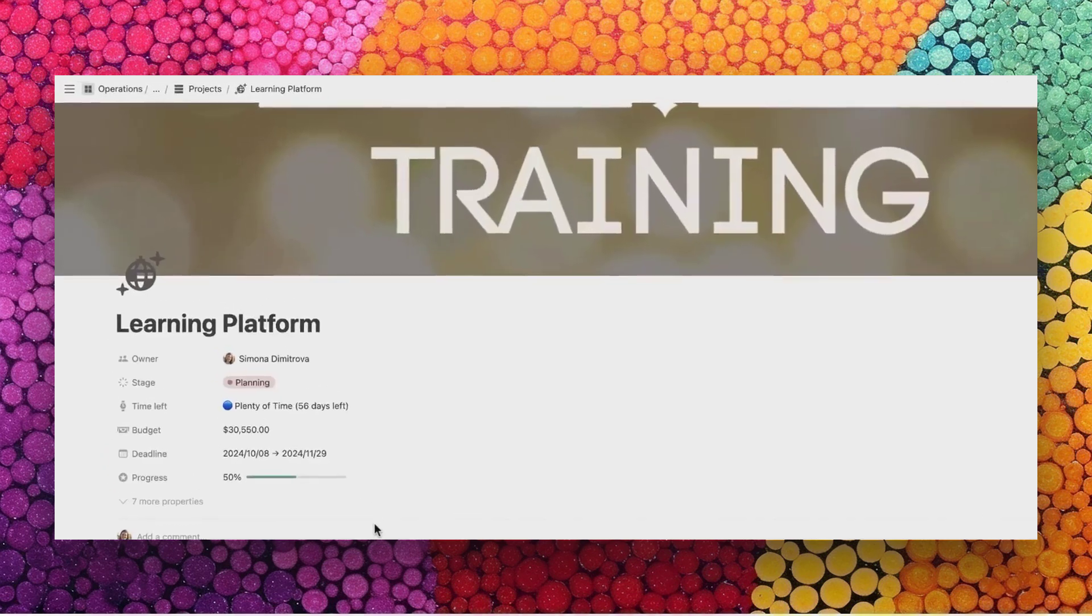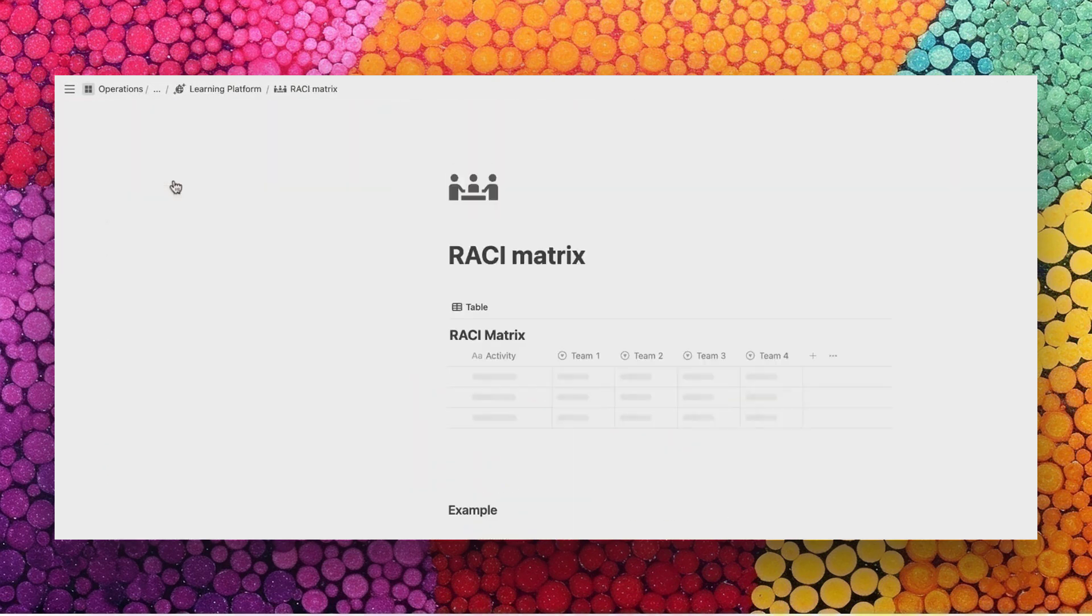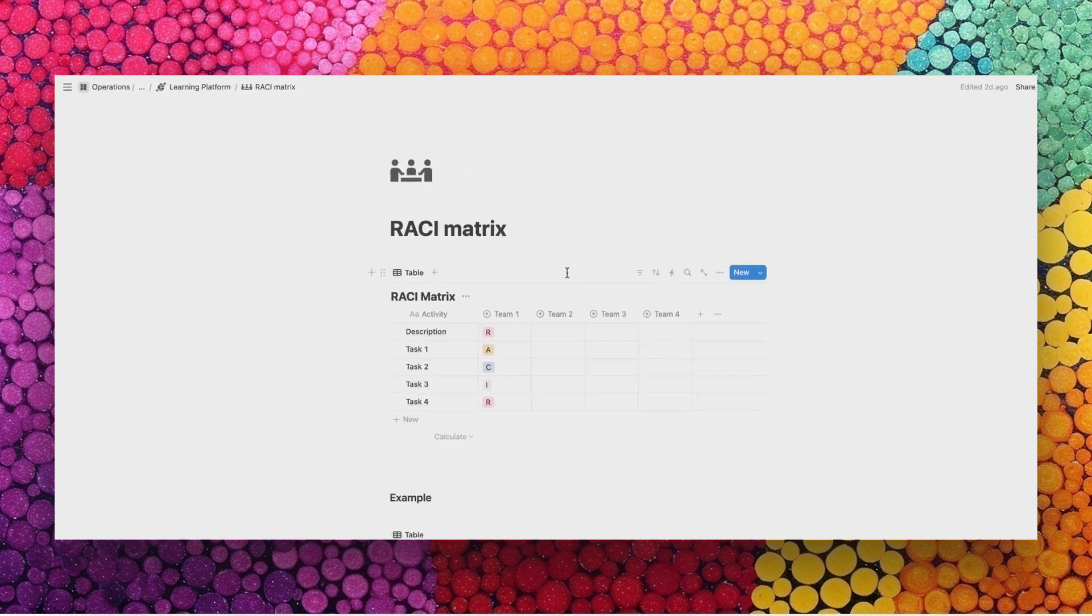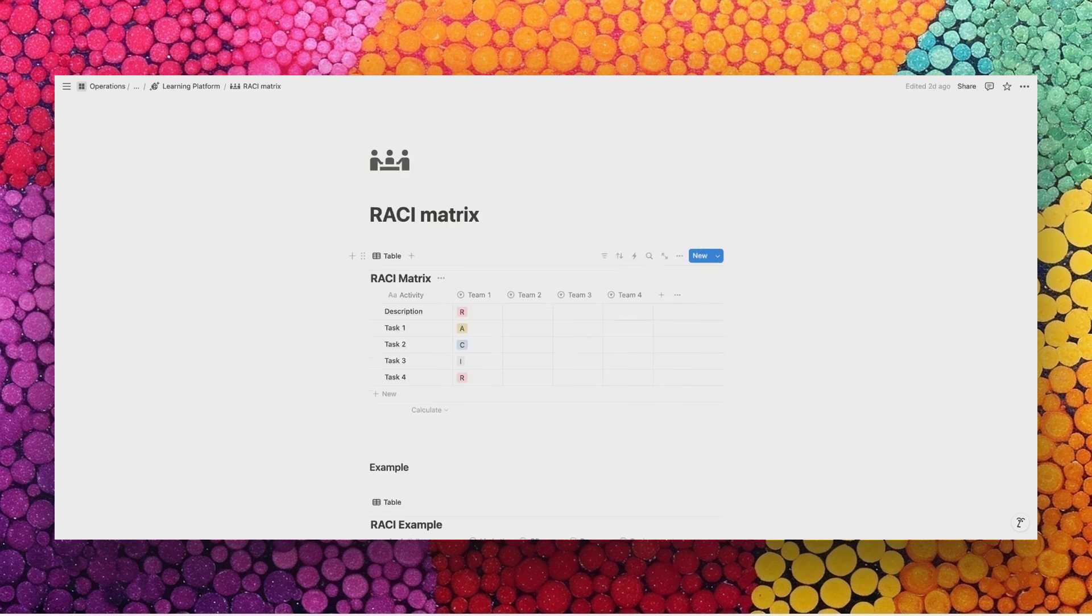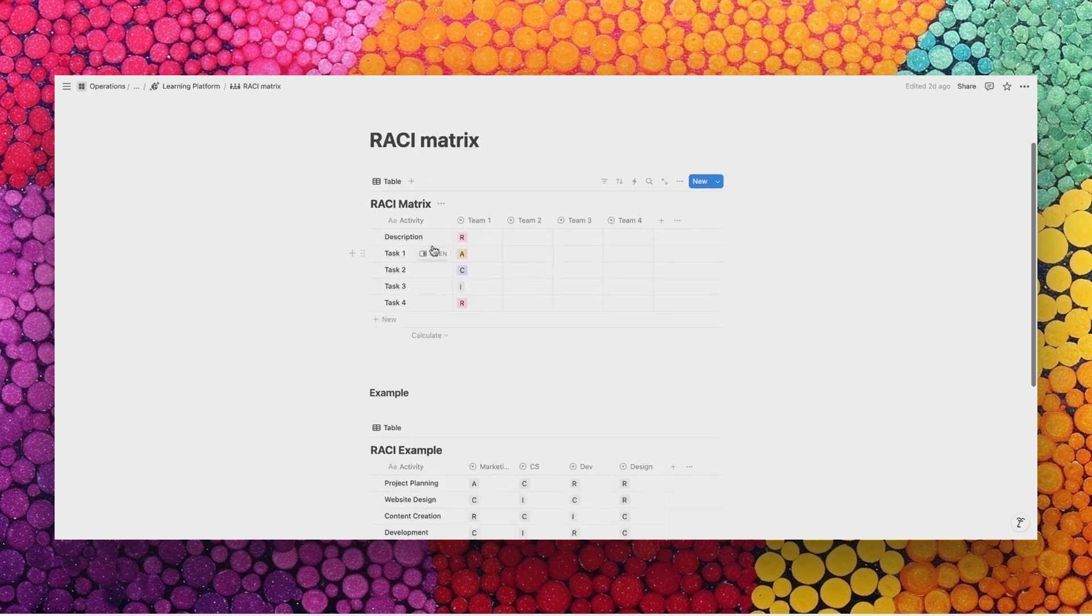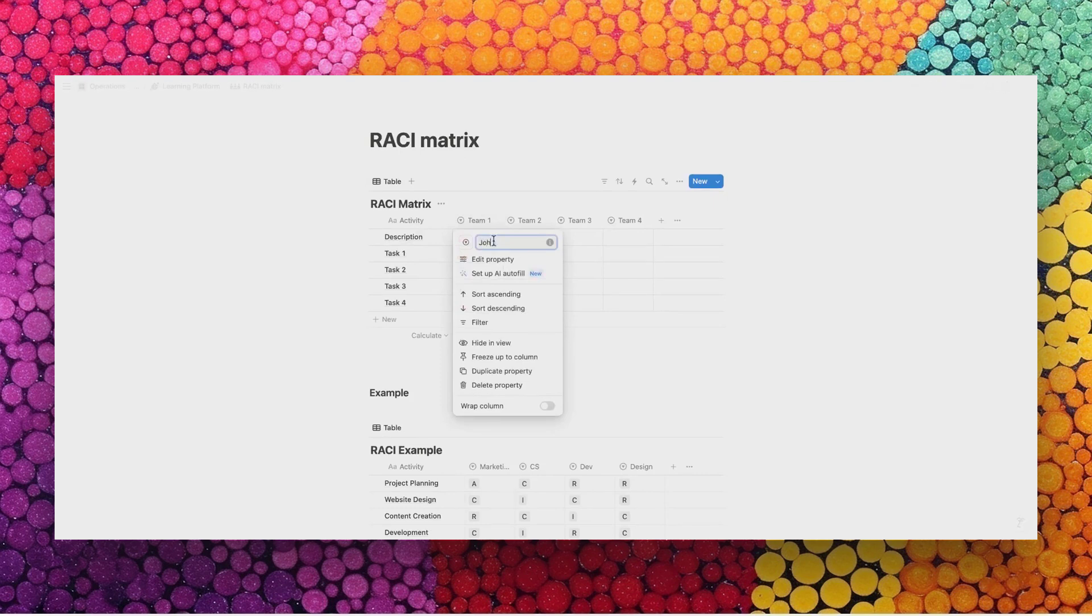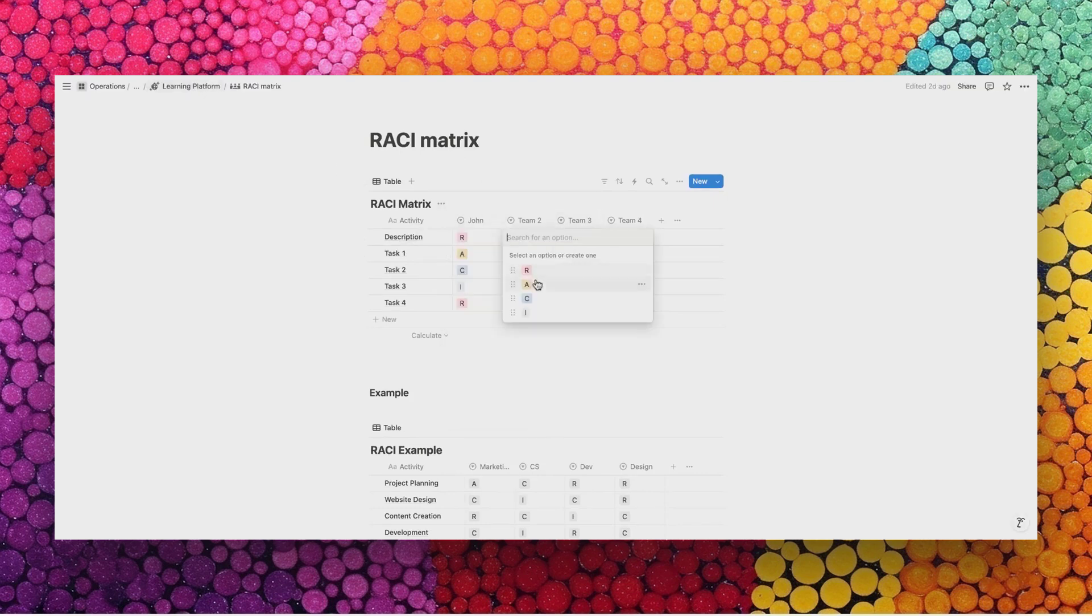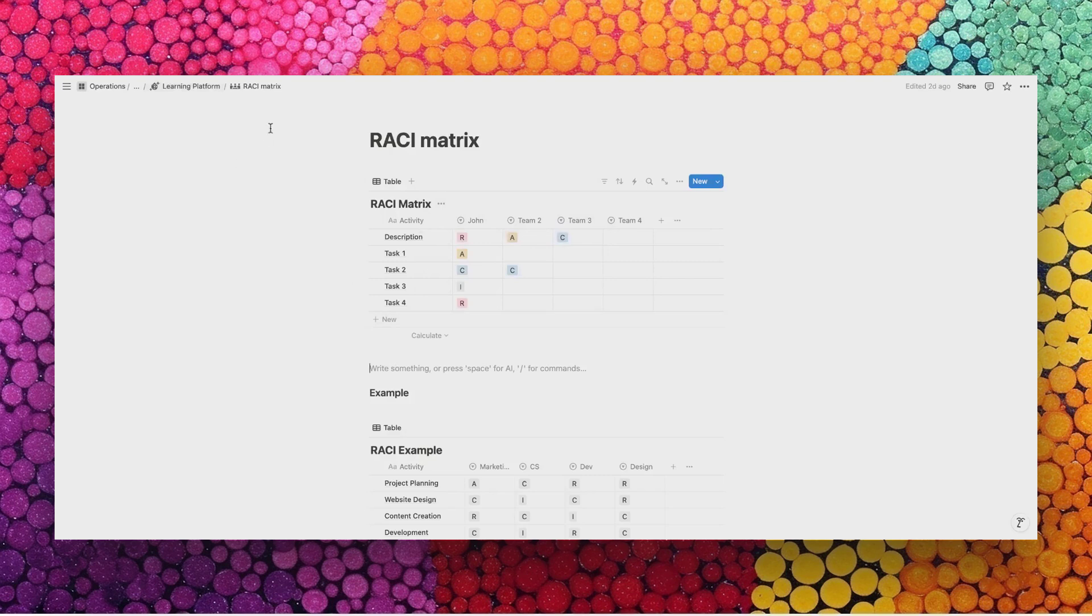If we continue with another document, let's look at the RACI matrix. The RACI matrix is extremely important in project management to help you manage the accountability of team members. You list all the tasks in your projects. Then you can either add the role of each team, or, of course, you can add individual project members. The purpose is to make a very visual representation of the roles and responsibilities within the project.